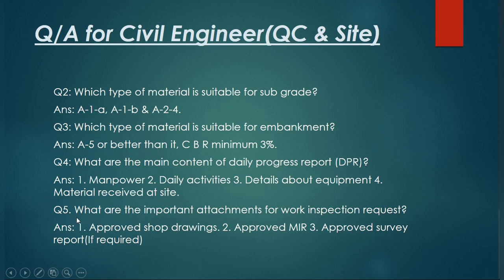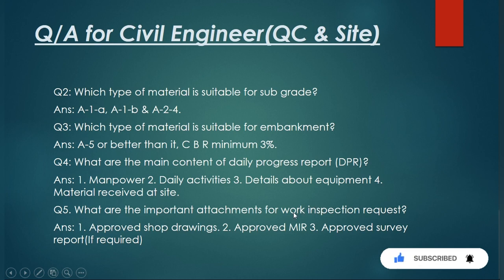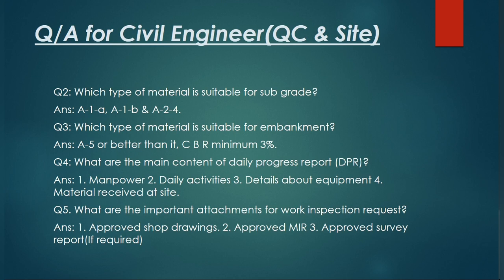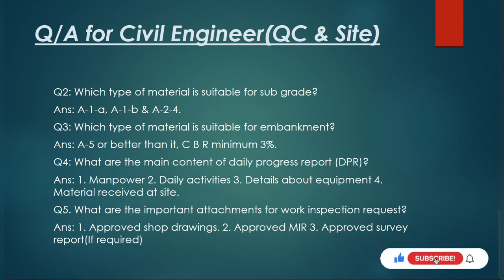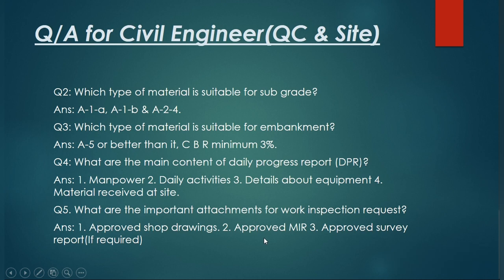Question number five: what are the important attachments for a work inspection request (WIR)? This is an important question for QC engineers and site engineers. First, you need to attach the approved shop drawing with highlighted location and structural details. Second, you need an approved MIR — material inspection request. If you are submitting a WIR for steel reinforcement, you must have checked the material at site beforehand and submitted the MIR. During WIR submission, you must attach the approved MIR.